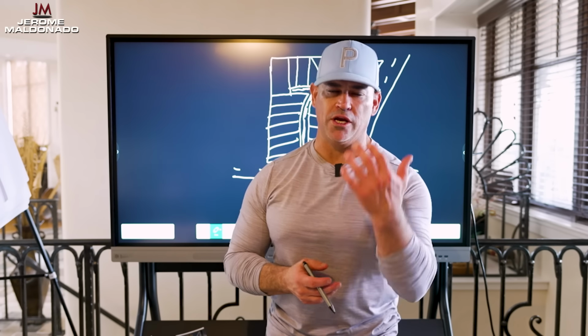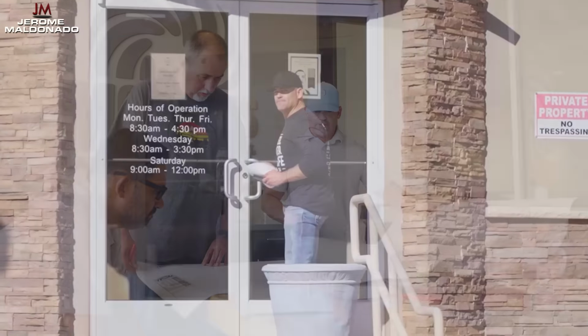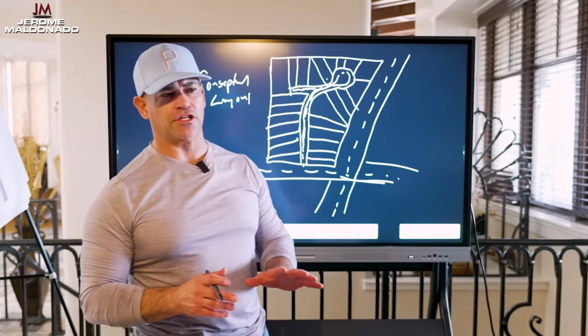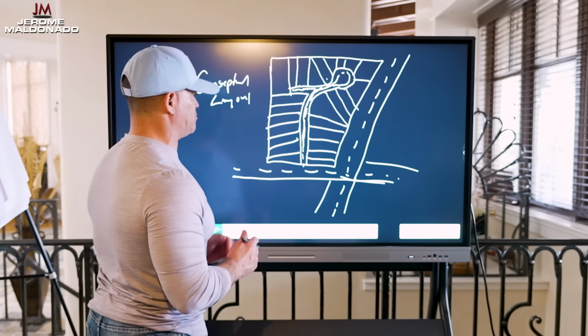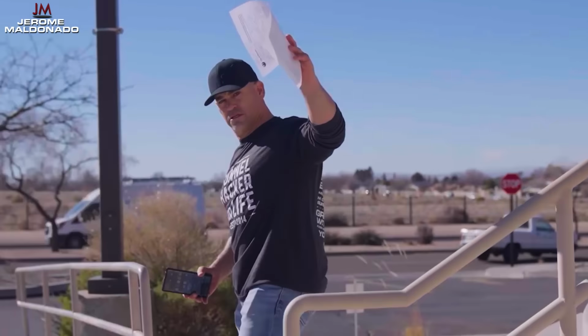So when we go in and we develop land, it's as simple as coming in and doing a conceptual drawing. Now, this conceptual drawing has to turn into a finished, working, approved parcel that you can utilize from all branches of municipal approval. Fire marshal's office, public works, building and zoning, public safety, parks and recreation. Everything that's required in that single municipality is going to be what we need to go in for approval for. Once you go in and you go in for full municipal approval, you're not going to go in and pull utilities.